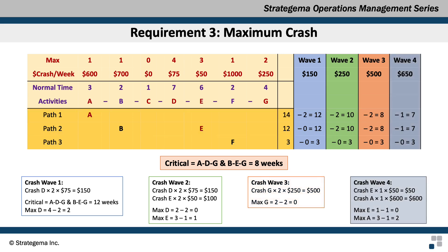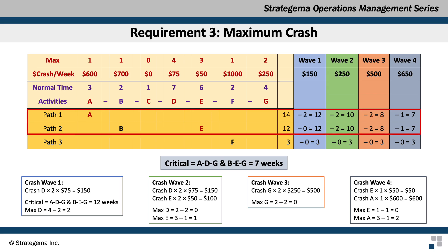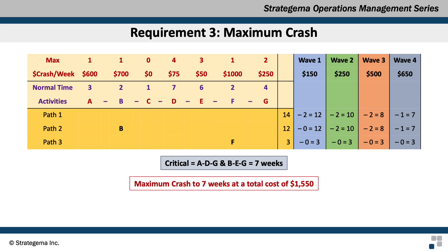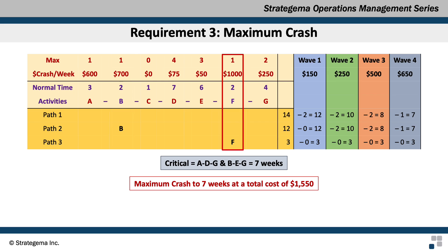For wave 4, there are no activities common to the critical paths, so we must crash different activities on each path. Activity E is available to crash by one week at $50, and activity A can also be crashed by one week at $600. This brings the project down to 7 weeks with paths 1 and 2 still critical. Activities A and E are now removed since they can't be crashed anymore, leaving only B and F. Crashing B would only reduce path 2, but path 1 is still critical at 7 weeks — so it would be wasted money. The same applies to F. Therefore, the maximum time this project can be crashed to is 7 weeks at a total cost of $650.